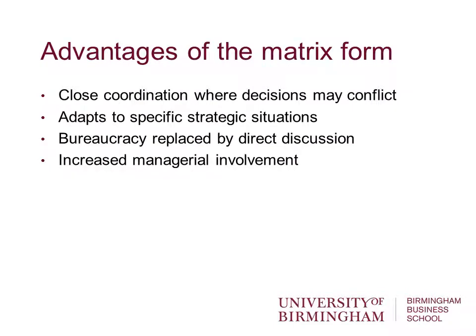Okay, so the advantages of the matrix form: close coordination where decisions may conflict. So the project becomes the environment within which decisions are made. It adapts to specific strategic situations. So project organisations are adaptable and flexible. Bureaucracy is replaced by direct discussion.